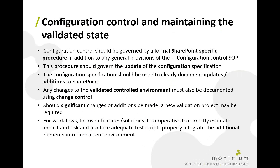Should significant changes or additions be made, we may need to launch a whole new validation project with a validation assessment, plan, and other required documents. For minor changes, we can typically reference existing functionality and test scripts within the change control form. For workflows, forms, or any other features or solutions, it's imperative to correctly evaluate the impact and risk of any changes, and produce adequate test scripts to properly integrate and test those additional elements in the current validated environment.